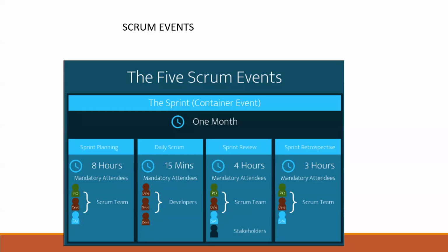Let us say 15 people are there, including you and the product owner. So 15 minus 2, 13. Now you have to divide these 13 into two teams. Make sure that they have the skill set required, the development and QA team or whoever it is. And you should have two teams. Split the team. We are not going to have one.